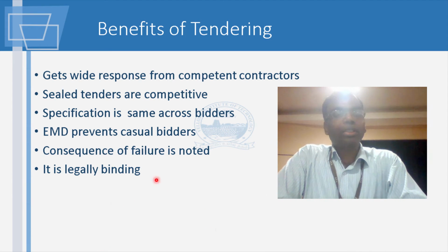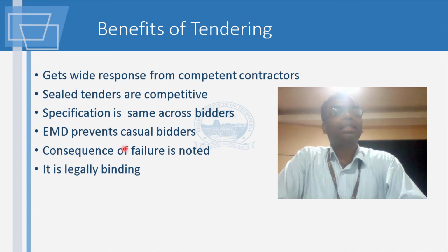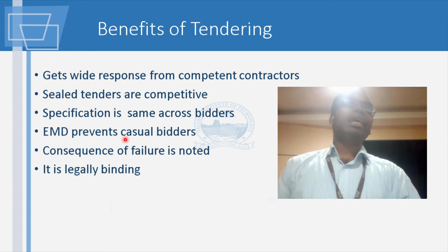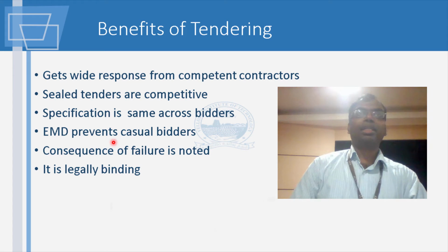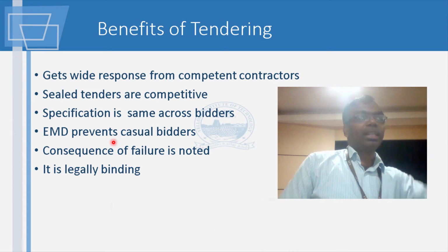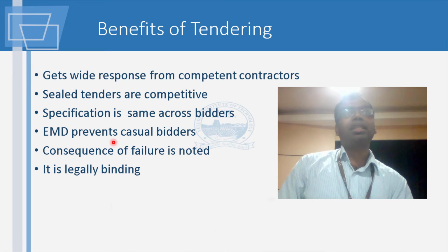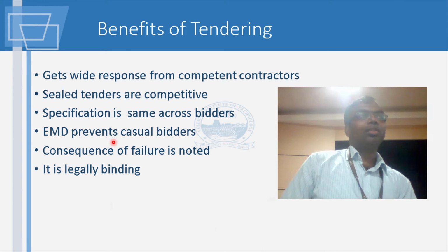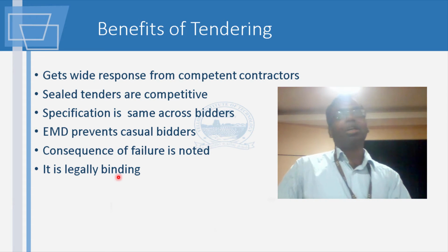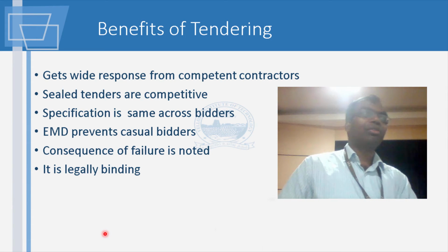Also look at this. EMD is earnest money deposit. Suppose you happen to be what they call L1. L1 is the lowest bidder. If you are L1, you will have to take the job if the person wants to give it to you. So suppose there's a power plant project, and I make a bid for one rupee. I am definitely the L1 bidder, but am I serious? Suppose there is a job which is to the order of a few crores,